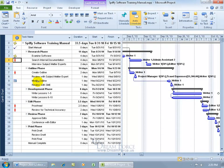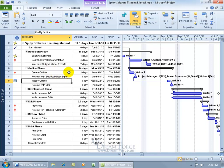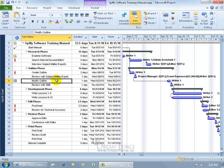Now, this constraint for Task 9 says that this task cannot start any earlier than September the 22nd. Well, when one task gets shortened, it creates a domino effect, and it wants to bring everybody in. And it does, it brings these two in, but it keeps this one because it can't start any earlier. So when these two get pulled in one day, then it goes from the 13 days to 14 because it's actually stretching it out, keeping this static, but pulling these in. So where it used to be 13 days, these guys get to start a day earlier, but this one's still stubborn, and it stays there because of the task constraint. So that's why it went from 13 days, because this one won't move up a day, it'll stay put, to 14 days.